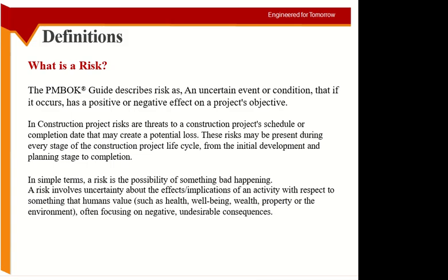Let's say you are working on a project where you have to test the flow of water in the end. And on that day there is rain when you have to test the flow of water. So there is natural water now and you can check it without consuming your own water supply. So that's like a positive risk for that day and for that project.